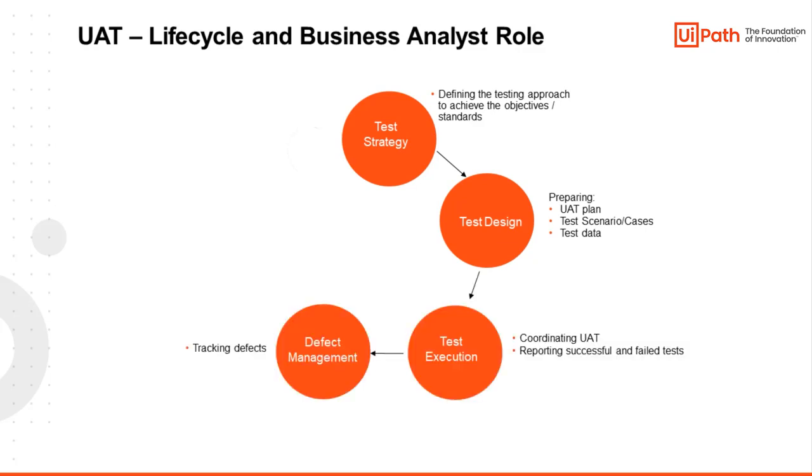In the absence of a project manager or implementation manager, the UAT plan is prepared by the business analyst, who then coordinates the entire process by ensuring that all the test cases are executed, collects the positive and the negative results, and provides the status of testing results. In the end, the testing is signed off.